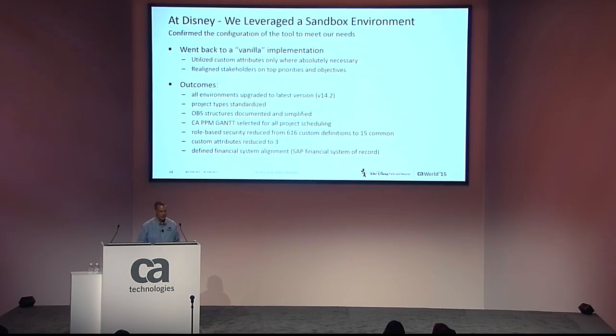Here's the big thing in terms of the roles. When we stepped back, we saw that we had over 616 custom roles defined that added complexity not only to the usability of the tool, but to the security model to support it. Through our sandbox, we proved that we could get the same results and information by having only 15 common standard roles that we could function through. What a difference in terms of the optics and usability of the tool.